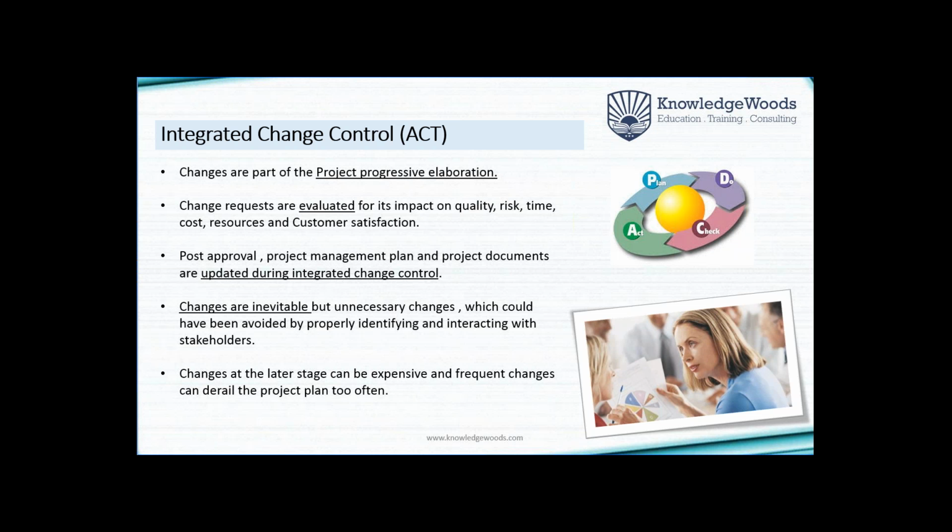Change requests are first evaluated for their impact on the quality of the baselined job. Is it increasing more risk? Is it increasing the schedule timelines? Is it increasing the cost?